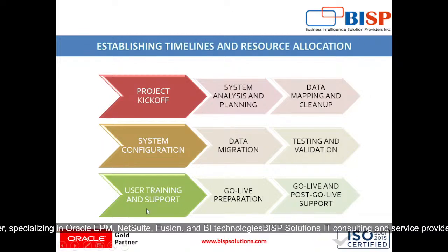Then comes our user training and support, which trains users on NetSuite workflows, reports and dashboards, which will take 12 weeks, where we will be providing user manuals and conducting Q&A sessions if there are any questions from the employees. Then go live preparation, where there will be a finalized cutoff date for QuickBooks operations, and we will be preparing a go live checklist like data validation is done, system backups are done, etc. So it will take around 13 weeks.